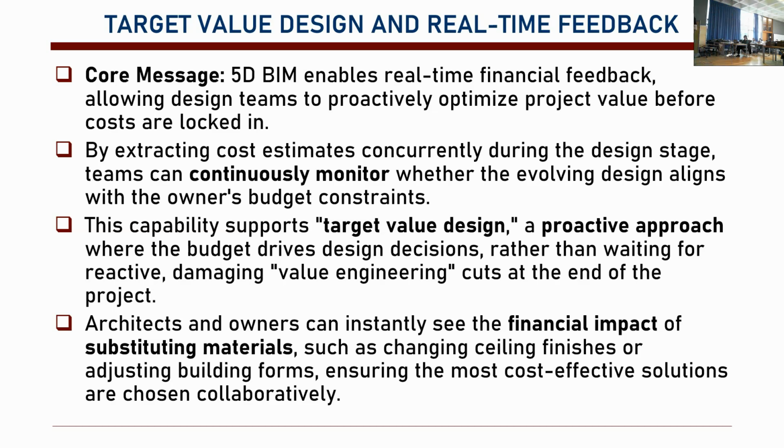This is what we call target value design. So based on the target value that you are aiming for, you make changes. You say, well, I'm going to make it shorter. I'm going to make it cheaper by using a different structural system or cladding, etc. Then it gives you that. This is what we call proactive target value design.